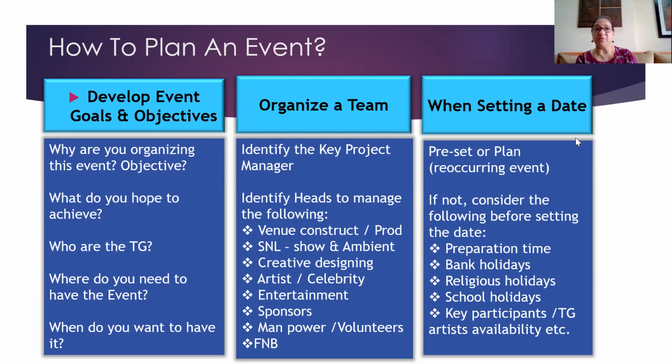You remember, you have your backward schedule plan. Are they doing it on time? For example, if you're building a set, on day 4, how much of the set has been built? Are we lagging behind? Do they have a shortage of labor? Or are they wasting their time? Things like that.